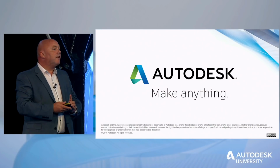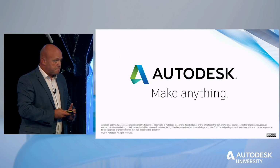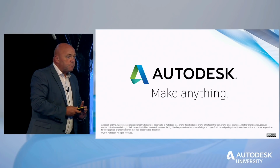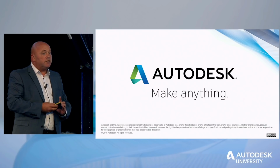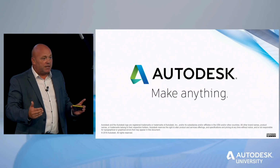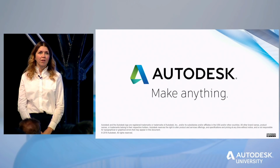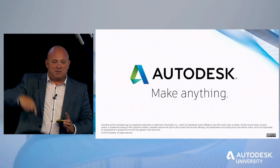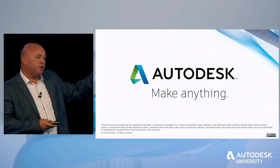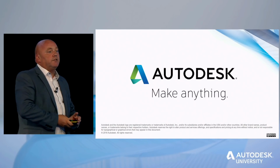Hi Steve, James Dixon from Wait. Hello. Great presentation, sir. Thank you for that. Quick one on clash management, on one of your earlier slides. Are they being auto-identified within the model, or is it something with search sets? We're doing search sets within traditional Navisworks, but we started with a high tolerance of 200 mil to get the numbers down of the big things where the bits of big plant were hitting columns and all that good stuff. Then we reduced it to 125 mil and then 75 mil at the end of design. And then we looked in areas, didn't we? So areas that we were currently working in, we would do a clash purely in that area as well, because we don't want to clash detect things on the plant room roof when we're actually coordinating the basement. Okay, so it's search sets in Navis, but when we got that new process going, we're using next-gen Glue just to monitor that by introducing a change, it wasn't going to present an extra 300 clashes, because we got the numbers right down. Great, thanks.